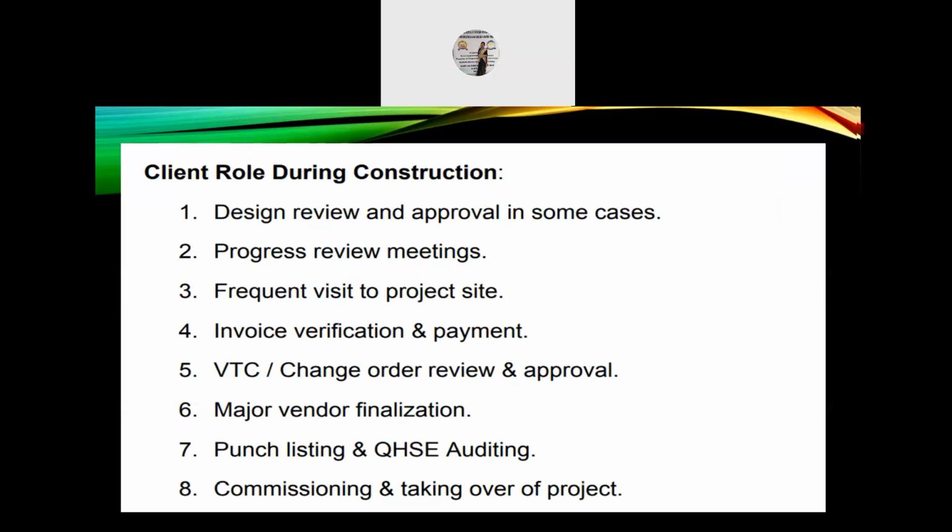Client role during construction. 1. Design review and approval in some cases. 2. Progress review meetings. 3. Frequent visits to the project site. 4. Invoice verification and payment. 5. VTC or change order review and approval. 6. Major vendor finalization. 7. Punch listing and QHSE auditing. And number 8. Commissioning and taking over of the project.